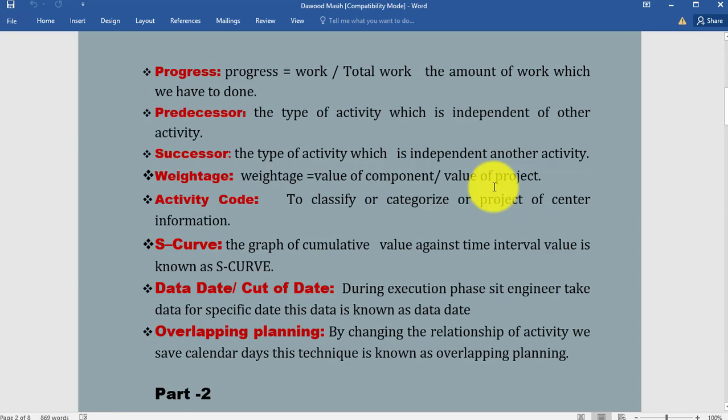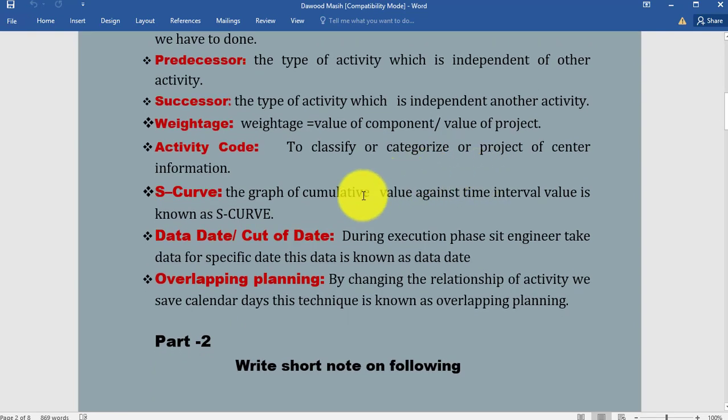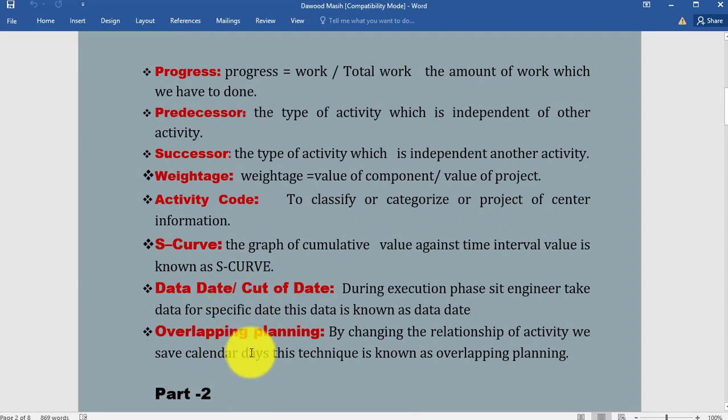What is S-curve? The graph of cumulative value against time interval is known as S-curve. In our execution phase we use S-curve very efficiently to execute our progress. These S-curves are used to measure progress.